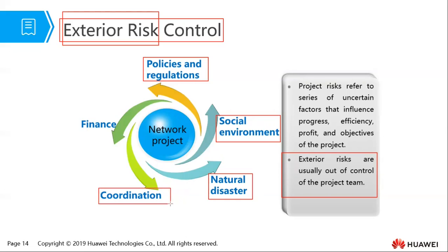We also need to understand something to do with coordination. We've looked at matching systems in the previous slide. There are other things that have to be implemented by other subcontractors, like the air conditioning, etc. Sometimes they might actually delay your project, because if they're not well handled, they can cause the delay of your project, because these switches and routers, for example, cannot operate without air conditioning. And they have to operate within a certain temperature limit.